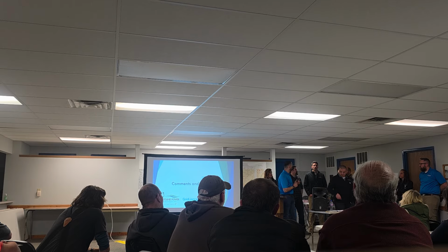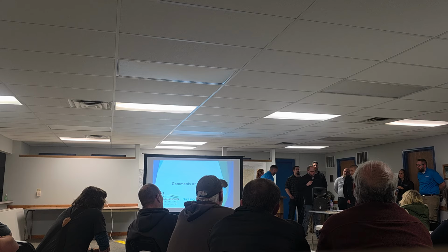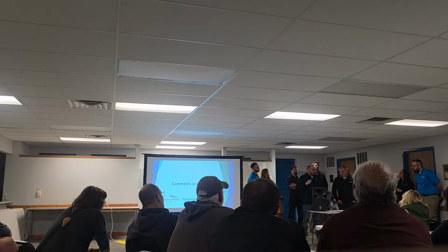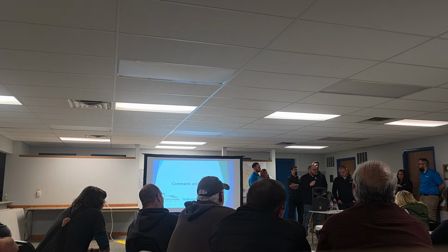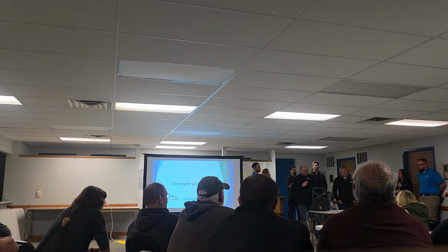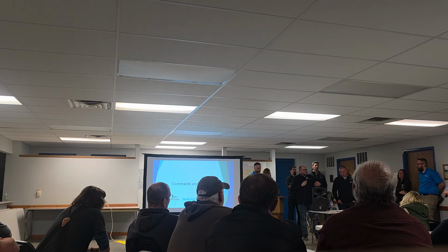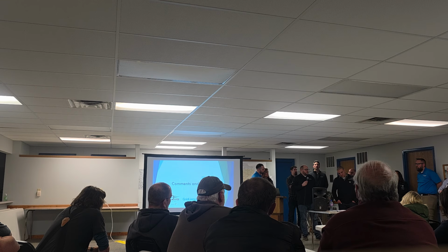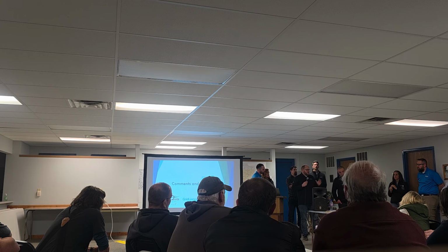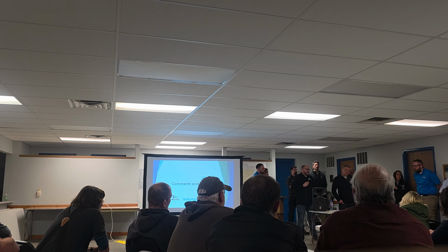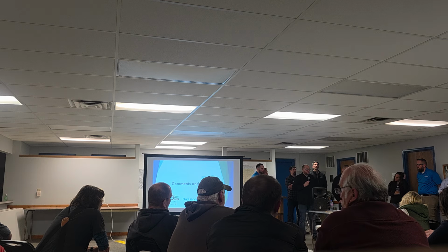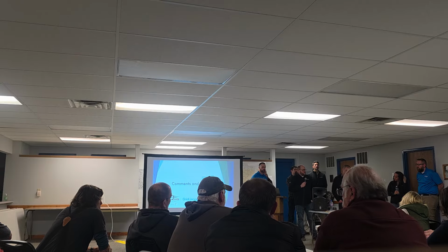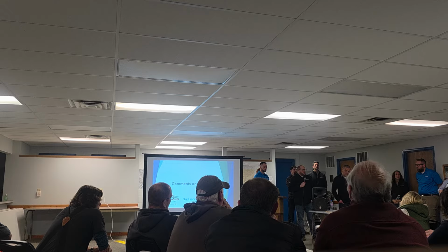I can speak to it. For the specifics, part of the CPCN process, assuming we get issued a permit to construct, there is a third party process where we have to compensate. The Public Service Commission has their own independent environmental monitor that watches everything, from the wetland impacts to the stormwater management. They also have an independent agricultural inspector. The developers have to pay for that, but they're not ours; they're for the PSC. They are the ones that control that. On top of that, like he said, we will have our own internal crews also watching all disturbance, making sure we're following our stormwater pollution plans and erosion control plans.